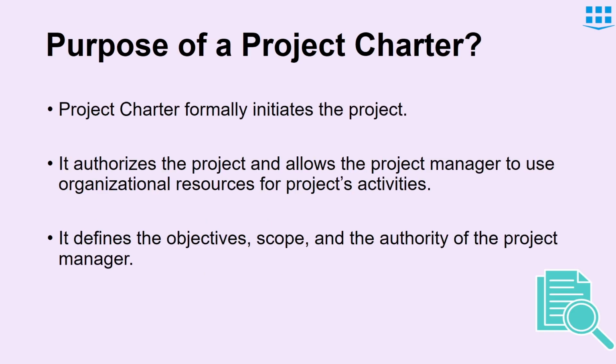So the purpose of a project charter is to formally initiate the project. It authorizes the project and allows the project manager to use organizational resources for the project's activities. Without the project charter, we cannot start any project officially. A project charter contains the objective, scope, and the authority level that is assigned to the project manager.